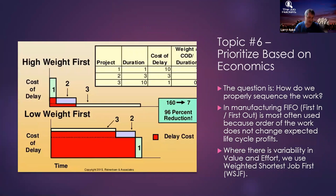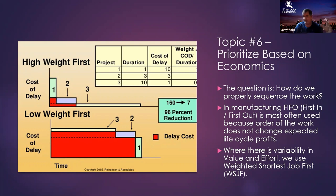Topic number six: everything should be prioritized — I prefer the word sequenced — based on economics. In practice, 'priority' tends to mean what the business wants, which is only the value side of the equation — roughly equivalent to cost of delay. But cost of delay alone isn't enough. I need to sequence, not just prioritize. In manufacturing, first in, first out doesn't matter much. In knowledge work, what we need is weighted shortest job first — the highest value over the least amount of effort.